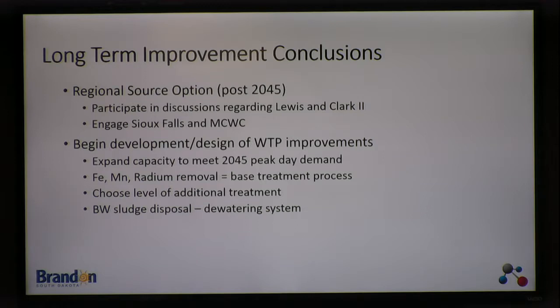So, I sort of oversimplified it a bit, but the idea is that these capabilities can be designed in. If you don't install it, that space becomes available. It's got a garage door. So what can you do with a garage door and a flat slab? You can do a bunch of things with that. You can use it for storage, you can use it for trucks. Got some options there. So it's pretty common for the RO section of the plant to be installed with that garage door, with space for future expansion. So there's some options there in the design of the facility to enable it to happen.